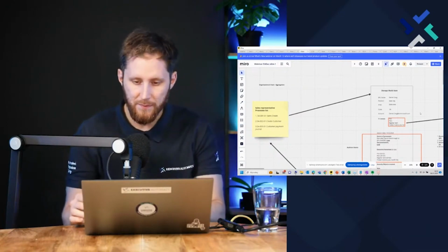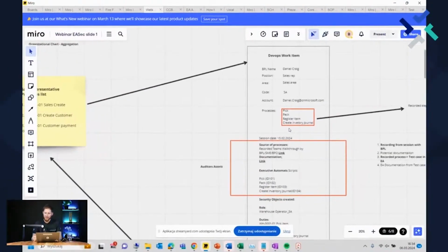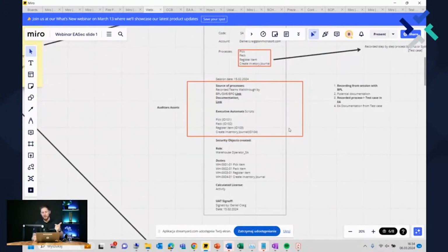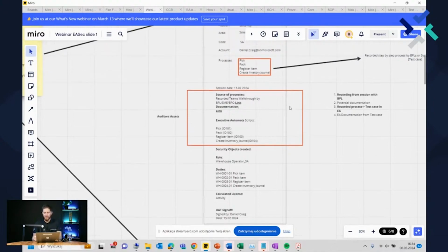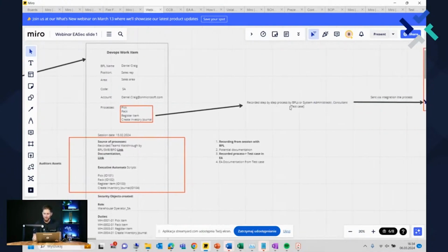That's the problem. So in DevOps, we're going to identify the processes, and then add more information about when it was signed off, what processes, duties, roles, and privileges were created. And that will give full transparency. You can communicate with SMEs, the program manager, testers, with everybody in the DevOps chat. So that's perfect communication and statuses: to go, done, in progress, and so forth. This will help you use DevOps for your whole project.